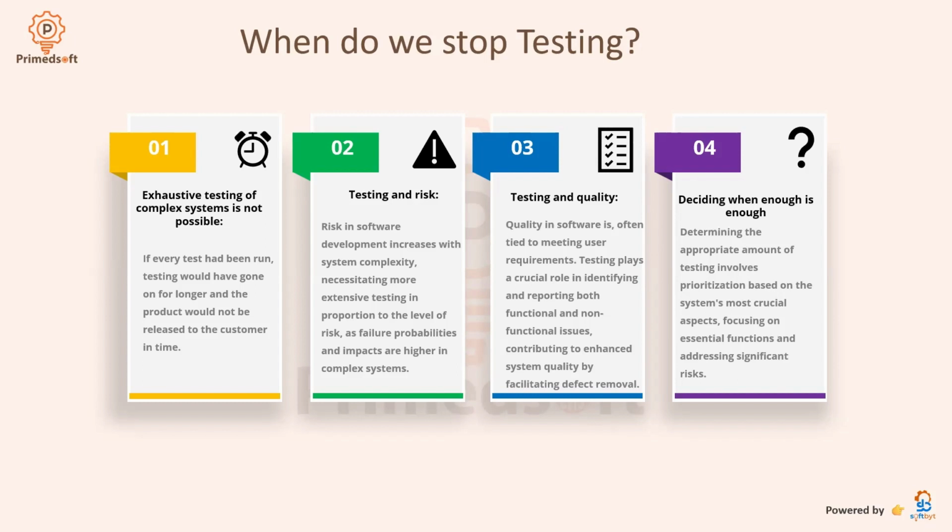Prioritizing the most important tests first ensures that even with reduced testing activity, the key aspects have been addressed. Establishing completion criteria, such as defining the extent of testing and acceptable defect level, provides an objective standard for deciding when it is safe to conclude testing, preventing confusion from time and other pressure. While compromise may be necessary, the approach ensures clarity on the required testing level and maintains the importance of testing already conducted, regardless of time or resource constraints.